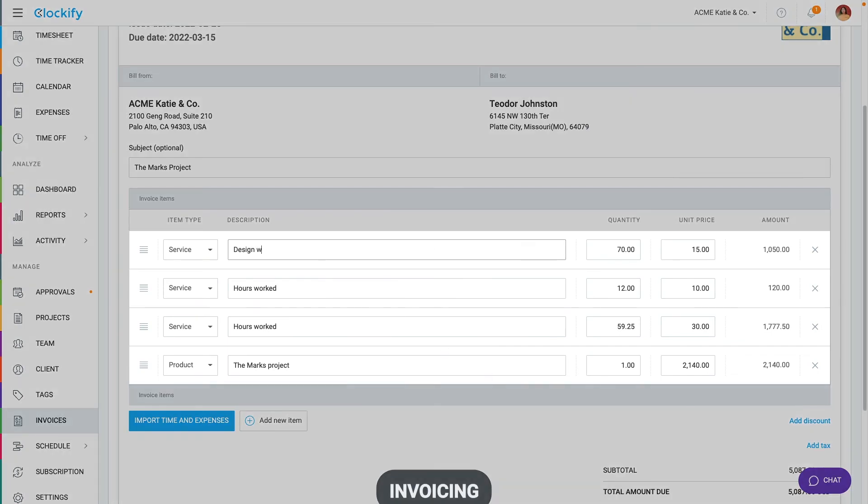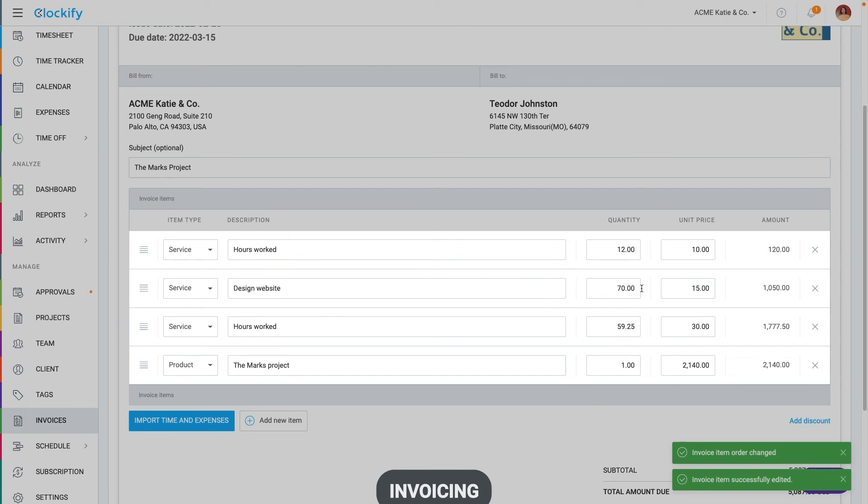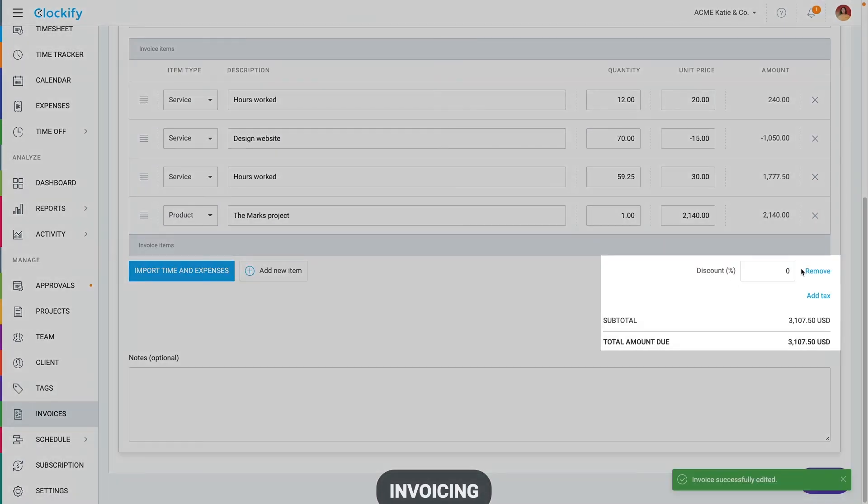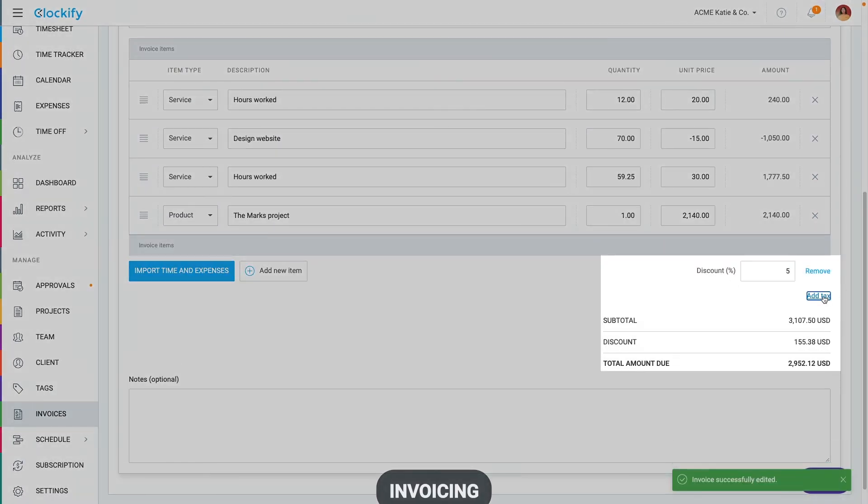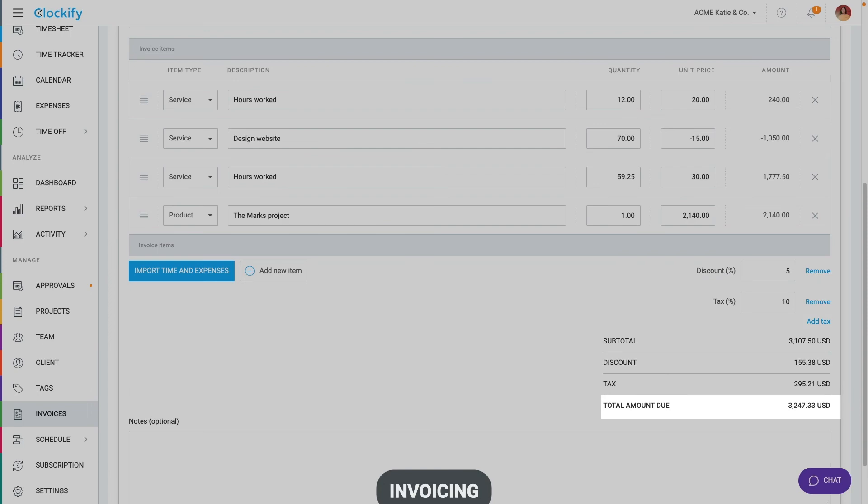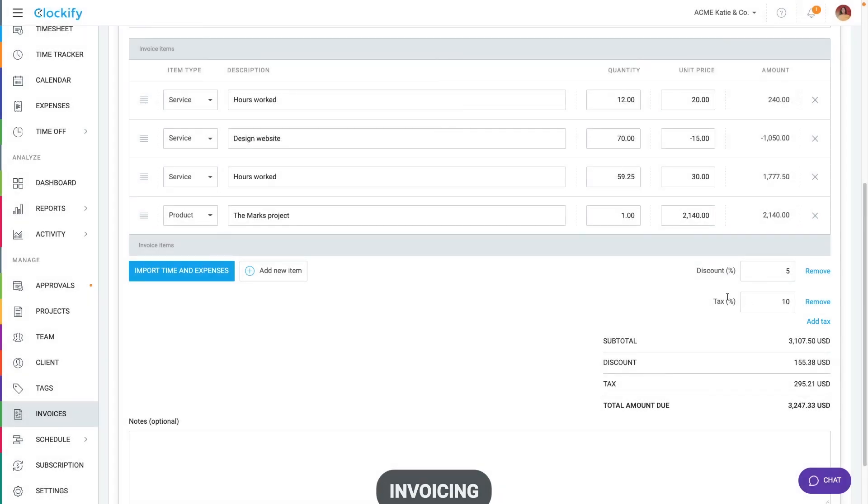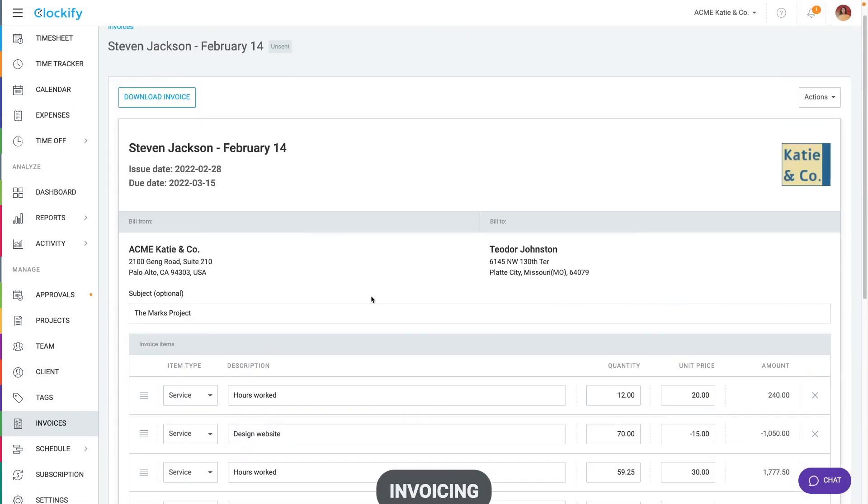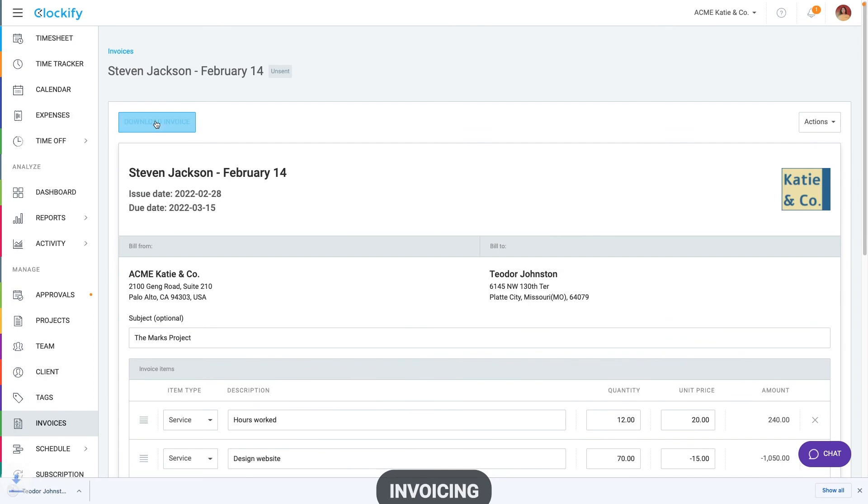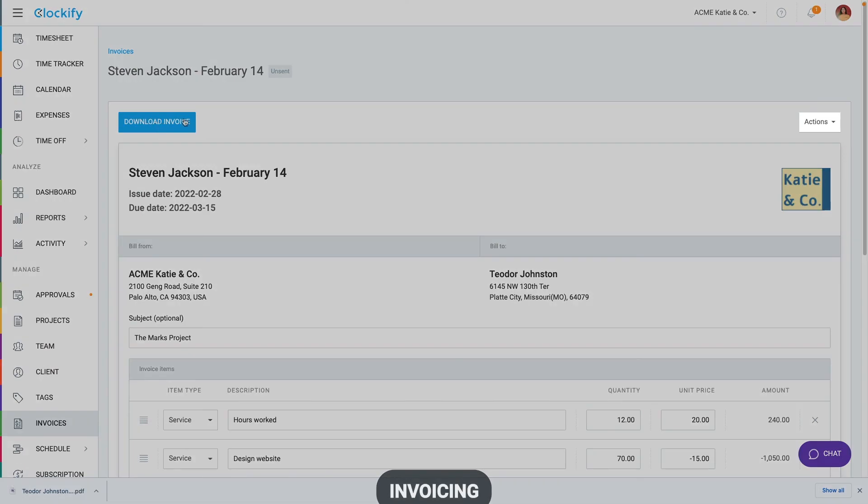Once the import is done, you can edit any item you want and change the description, order, price or add a discount. In the bottom, you can add a discount or tax and see the invoice total. Once you're happy with the invoice, download it as PDF and send it to a client and change invoice status here.